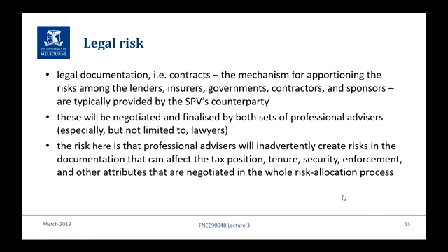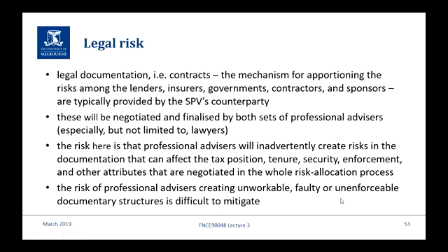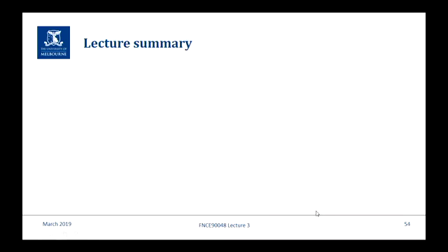So we'll talk about this a little more. The problem is that most of the legal risks, most of the faulty contracts are where they haven't addressed a situation that no one expected to happen. And only when it happened, you look at the contract, and the contract is silent. Oh, we weren't expecting that. What happens then? And so that is difficult to mitigate.